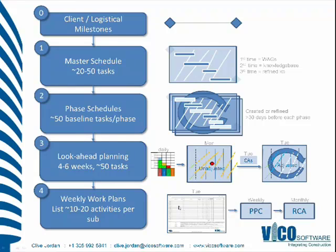The weekly work plans show the tasks for the week being defined and the assignments — the much more granular activities required to complete each task. Each item in the list might be something like 'clear area,' 'check RFI answer,' 'collect materials,' or 'prefab a cage.' All of these items are far more detailed than what we would have in the phase schedule and look-ahead adjustments.